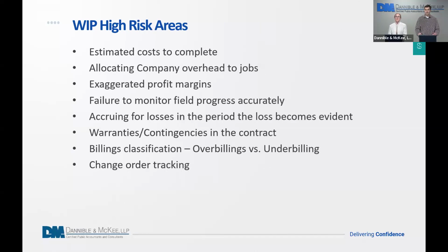And change order tracking. A lot of times there are change orders, and they can sometimes take a while to be approved by the customer. You just want to make sure that the change order tracking is accurate and that management is comfortable with it, how it's going to impact the contract value, and how it's going to impact the total estimated cost to complete.